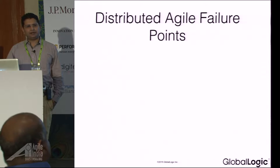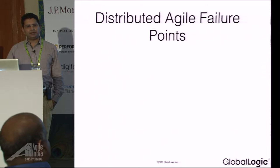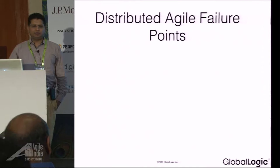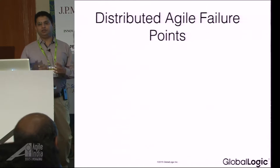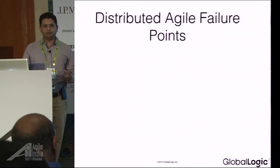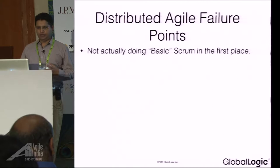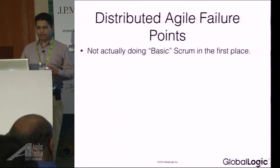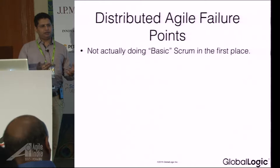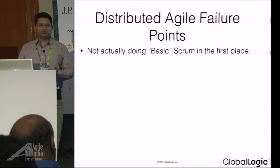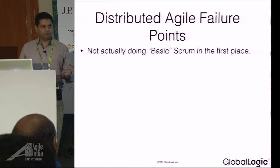Before we start talking about different patterns, let's see what the failure points are. What I've seen is that we started blaming the distributed way of working, but actually there are basic problems in the way you are working right now. The first thing is not actually doing basic Scrum in the first place — there is no retrospective, no planning meeting, and you are not measuring velocity in story points. If Scrum is not working, it is very difficult to determine if distributed Scrum is the problem.